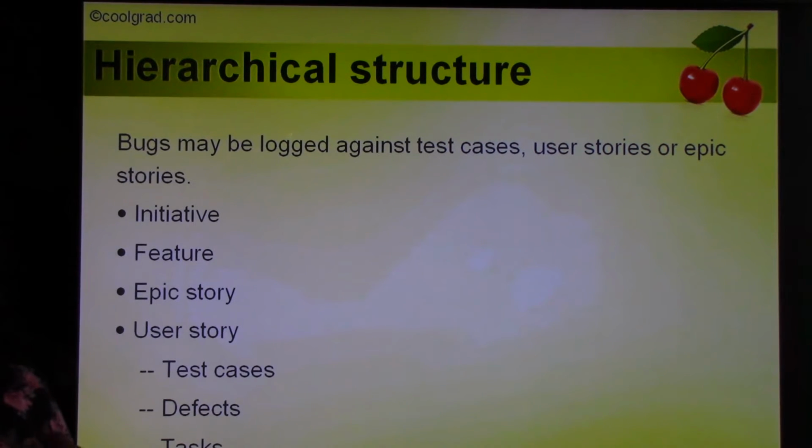So for the individual user stories, you might have 3 different stories for 3 different scenarios. Like the customer calls by phone and tries to create a case, and if the case already exists, the system must update the case, else it must create the case and give him a number, case ID. So this whole thing about initiating a case by phone is one user story. Initiating a case by email is another story. And initiating a case on the customer portal is another story. So these could be 3 different user stories. Test cases. So each user story can have multiple test cases under it. There are UI test cases, positive test cases, negative test cases, and regression test cases, and all these test cases for each user story.